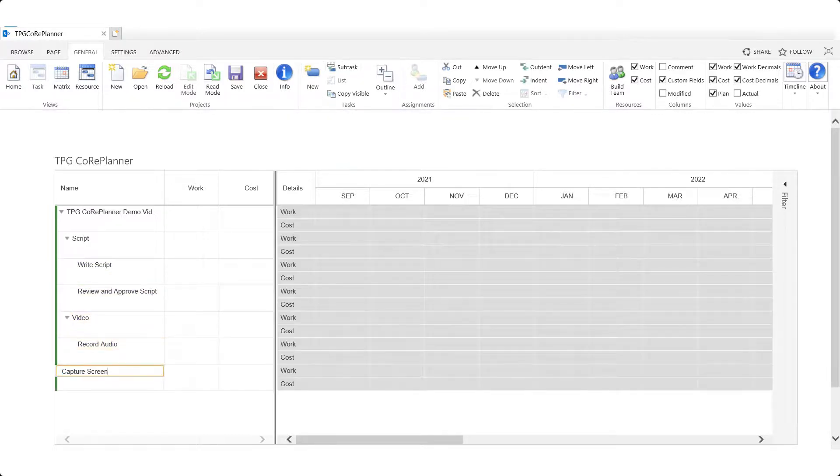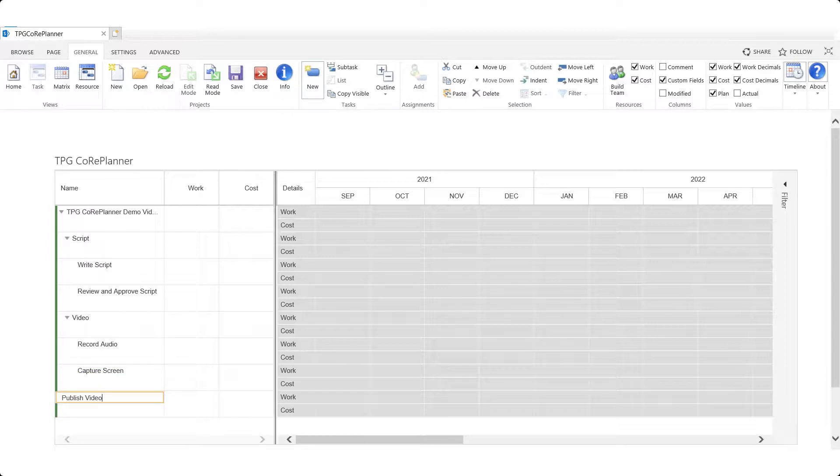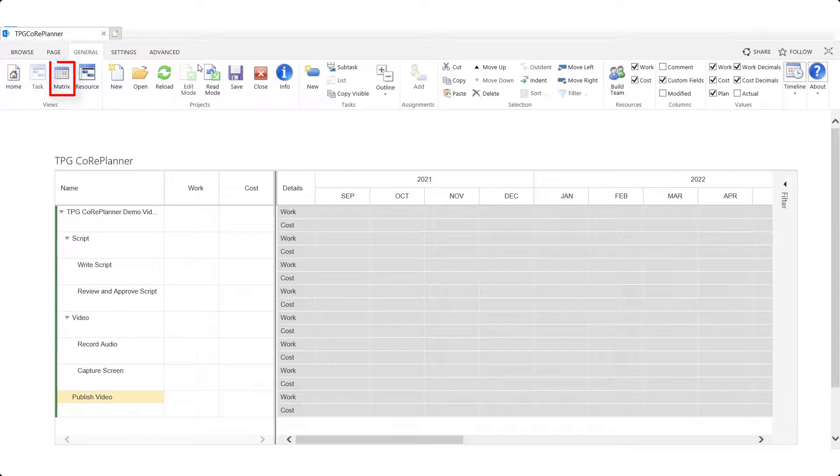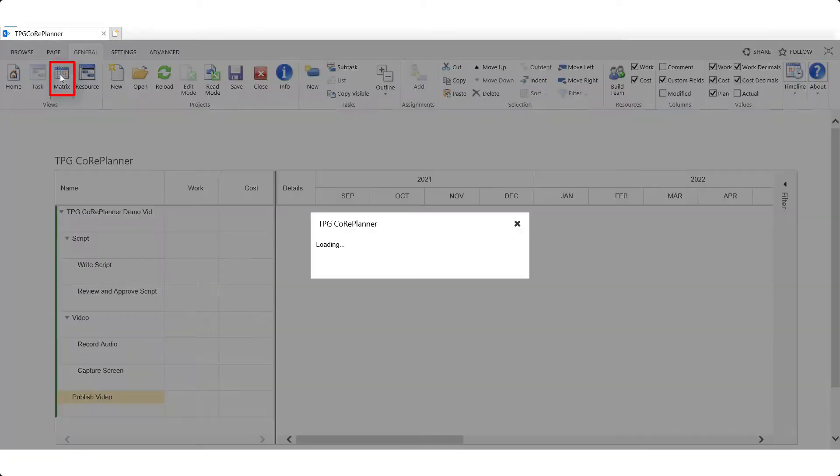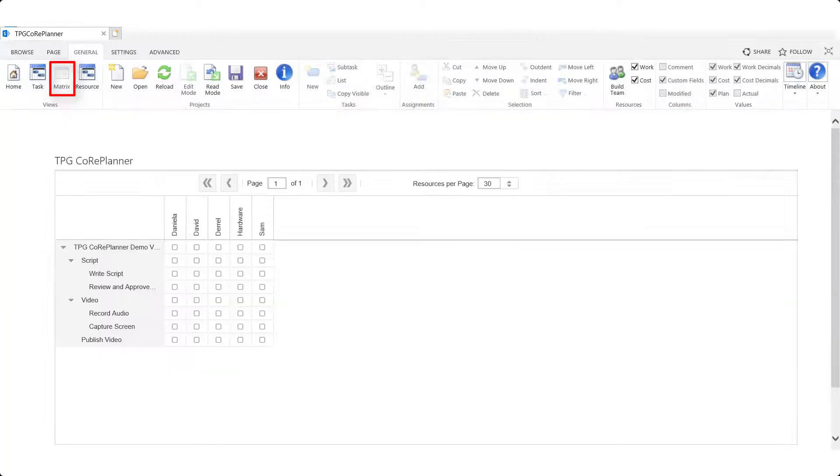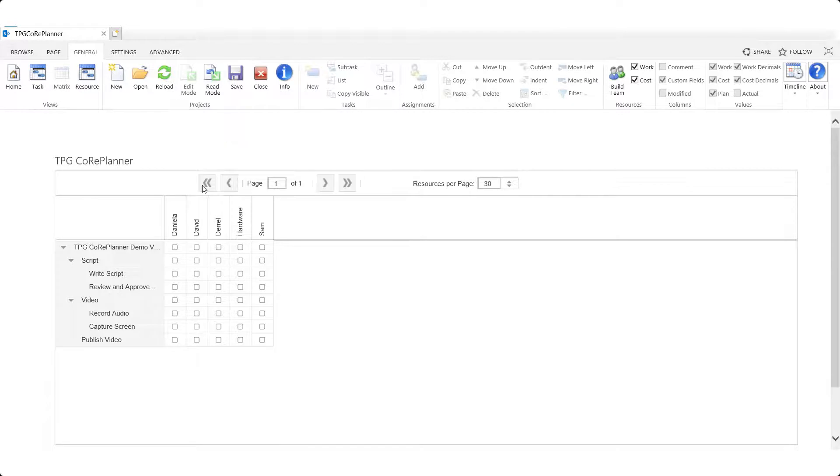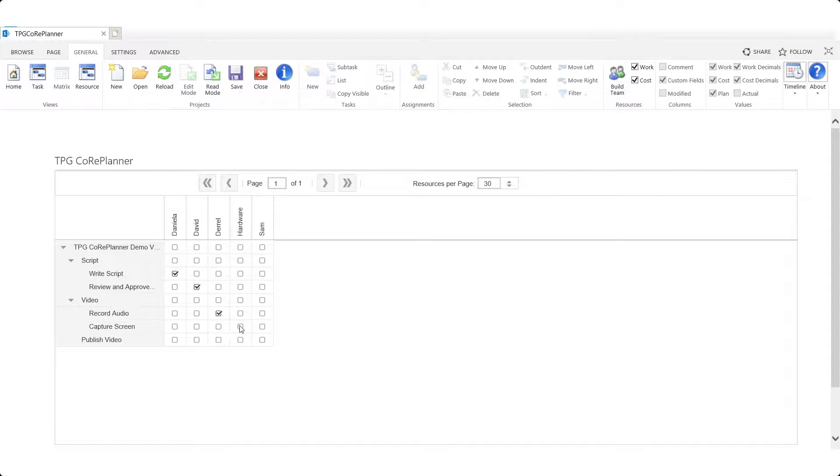Once tasks have been created we can proceed to assigning resources to them provided they were assigned to the project using the build team feature discussed earlier. To assign resources to tasks click on matrix which can be found in the views group. The screen opens up a matrix containing tasks and resources. Select the check boxes for the desired assignments.